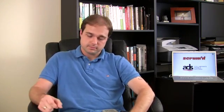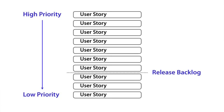Here we have a product backlog already sorted in priority order with the highest priority items on top, and we've already selected the user stories we want for our first release. This brings up another great point: in Agile, we fix time and resources but we adjust scope. This allows us to remain flexible and to be able to adapt to continuous changes in business.